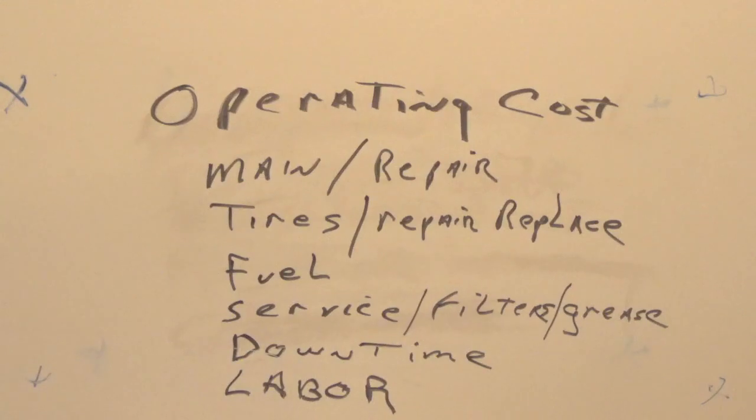So a lot of times the best thing to do is to take your worst laborer, or your worst equipment operator, or your worst whatever man is doing, and use his numbers in operating costs. Now, if you can refine that by teaching them, have a couple classes on stuff and make this better, you're actually being able to cut this cost, and that makes your company better. So, if you have a company where all the men on a certain crew are conscientious, or actually company-wide is a goal to have everybody conscientious.